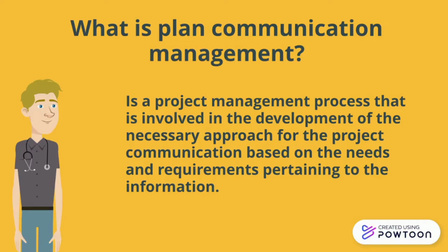The benefit of this particular project management process is that it helps to identify and document the plans, approaches, or strategies in communicating effectively with the stakeholders. To create the plan communication management, necessary inputs are needed such as the project management plan, organizational process assets, and enterprise environmental factors. The project manager also needs to get the stakeholder register to know who the stakeholders are.